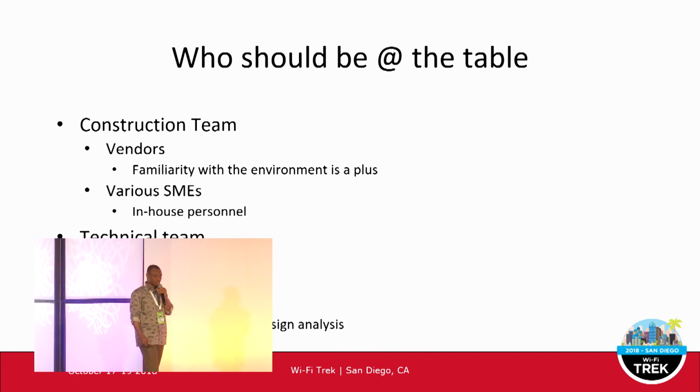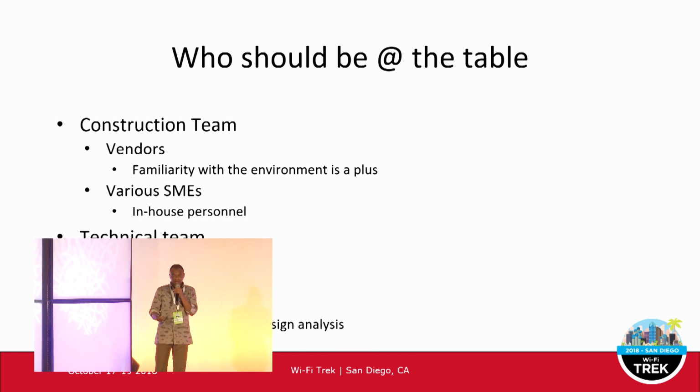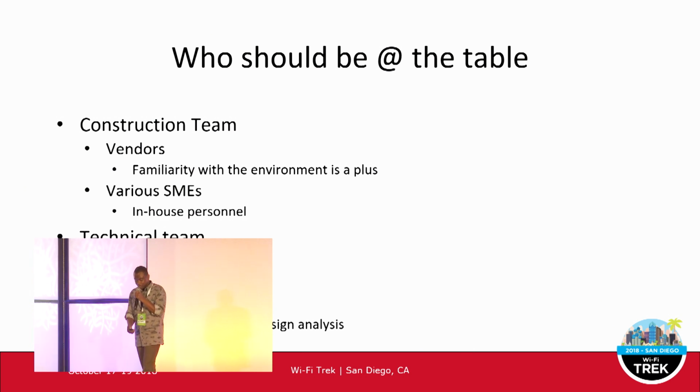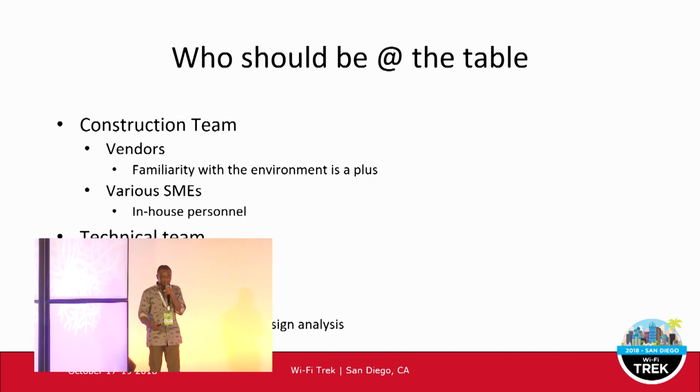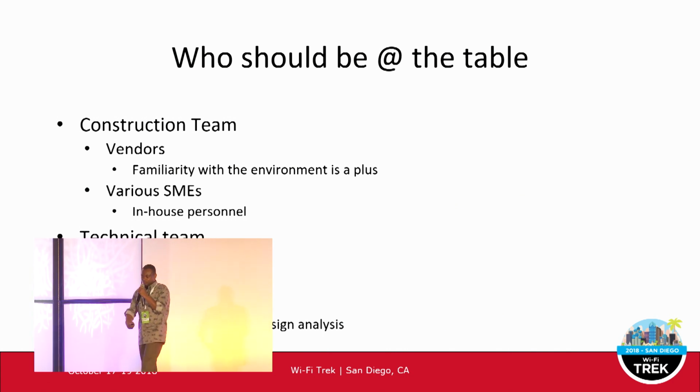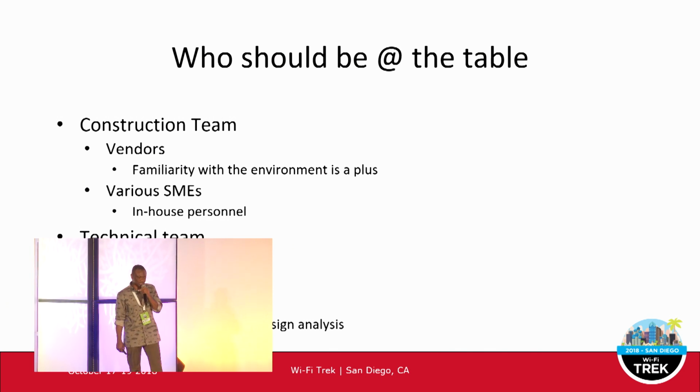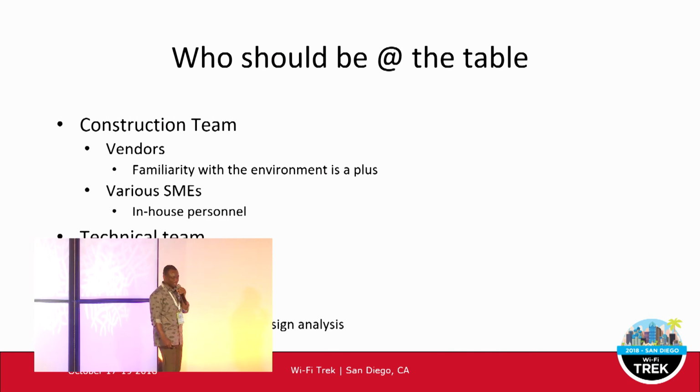So you need to involve the construction team. It could be the vendors, it could be the ones in-house. Depending on their expertise, they need to be involved ahead of time. So the reason is that if you don't get this going, when you need them a day before, 1 week before, they say, hey, I don't have time, that is not in my schedule.